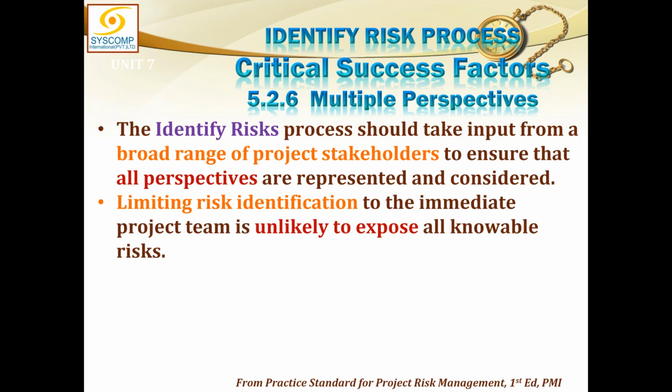Multiple perspectives. The identify risk process should take input from a broad range of project stakeholders to ensure that all perspectives are presented and considered. Do not take a risk just from one stakeholder's mouth. If a stakeholder has given a risk which is not really very reliable, you can share that risk with many other stakeholders and ask their view about it. That risk may either be confirmed or not confirmed. And even if it is confirmed, it would have even better reasoning to be included in the risk register. Limiting risk identification to the immediate project team is unlikely to expose all knowable risks. So involve as many stakeholders as possible.